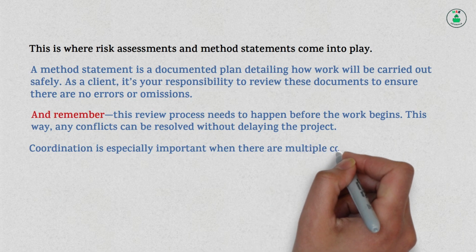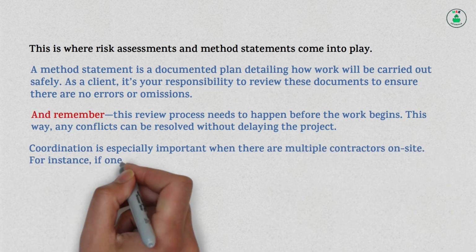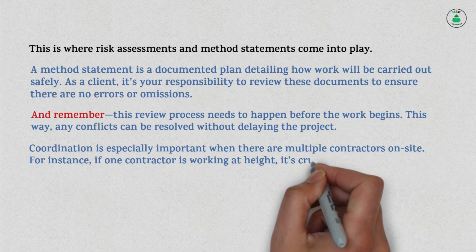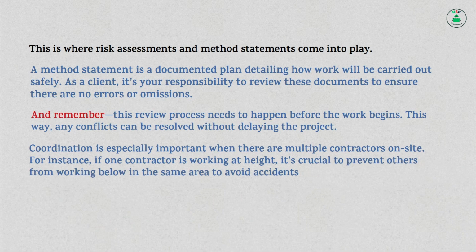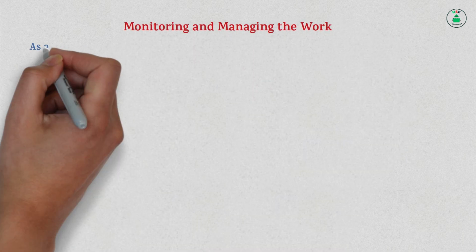Coordination is especially important when there are multiple contractors on site. For instance, if one contractor is working at height, it's crucial to prevent others from working below in the same area to avoid accidents. Monitoring and managing the work.